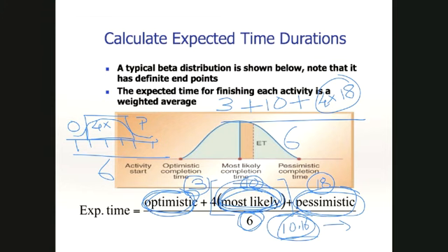because of how long you plan. Now, think of how this changes it. So 4 times 18 is 72, and 10 is 82, and 3 is 85. So 85 divided by 6. Can somebody help me? How much is 85 divided by 6? 14.16 or something like that. Thank you, Ben. 14.16. Now look at how it changed.